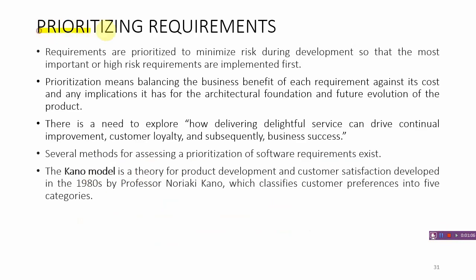Let us talk about prioritizing requirements in much more detail. Requirements are prioritized to minimize risk during development so that the most important or high-risk requirements are implemented first. Prioritization means balancing the business benefit of each requirement against its cost and any implication it has for the architectural foundation and future evolution of the product.